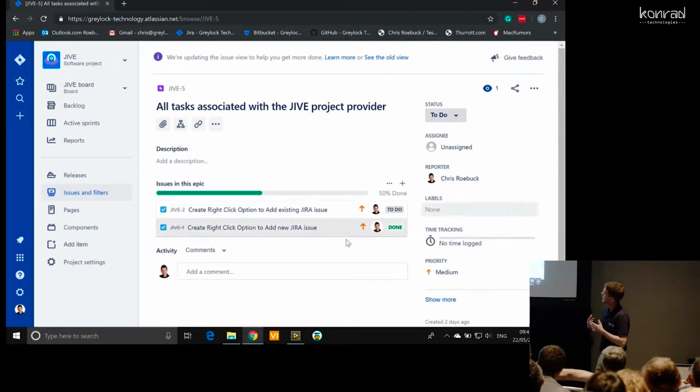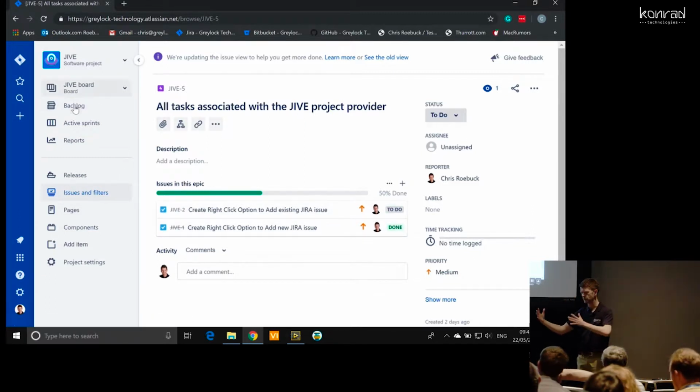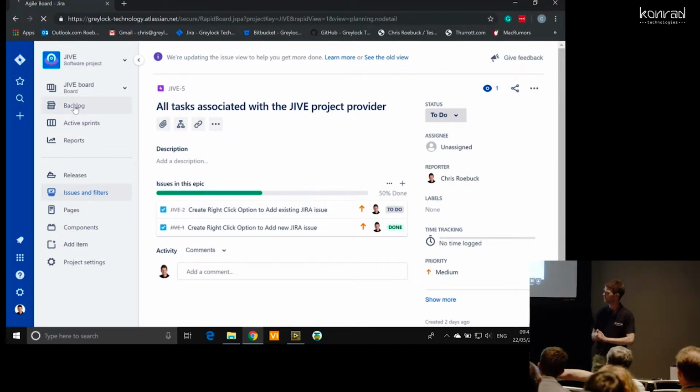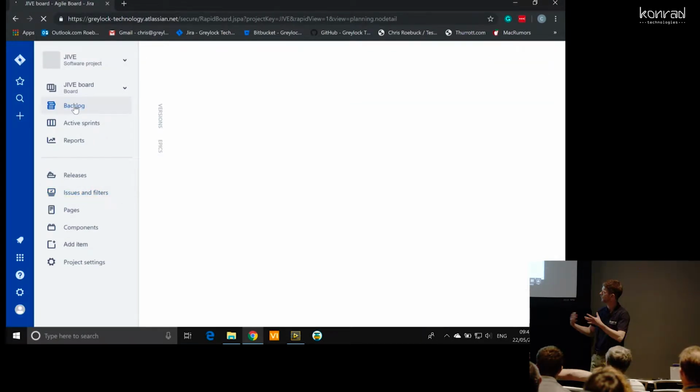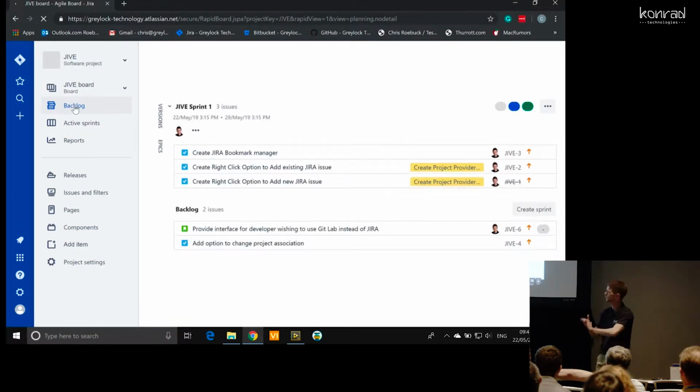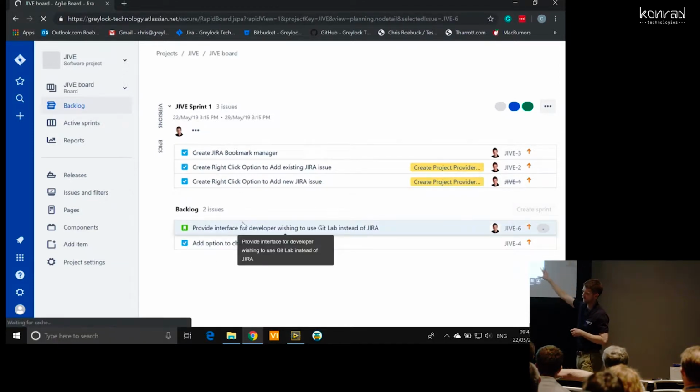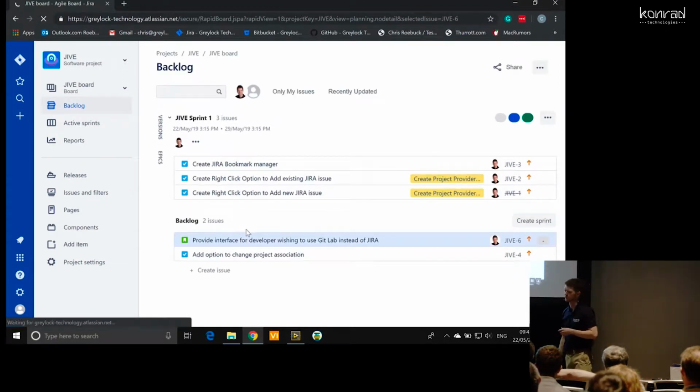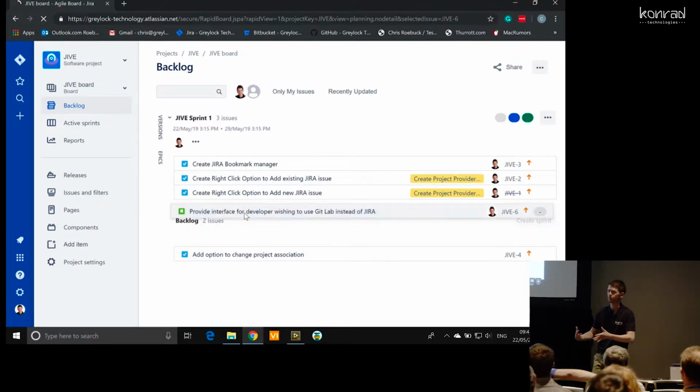And what we can also do is create sprints. So we can say, okay, for the next 1 week's duration, 2 weeks duration, I'm going to be focusing on these tasks. And under the agile methodology, I wouldn't look at anything else. I would just focus on those tasks. So you can see we've got a nice, highly visual interface with JIRA that allows us to look at what work and to plan what work our team needs to do.